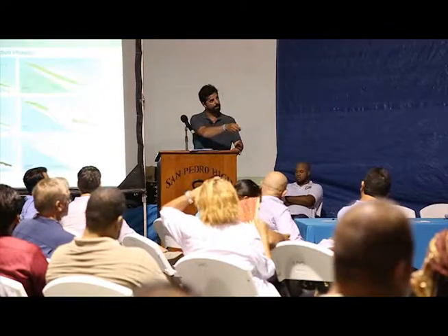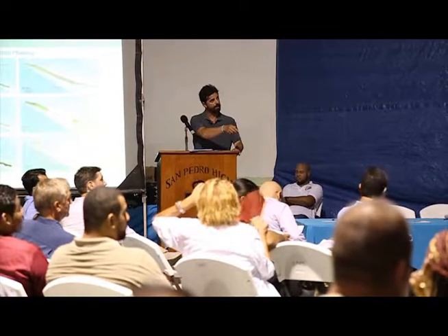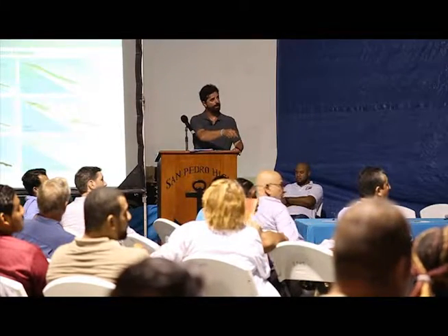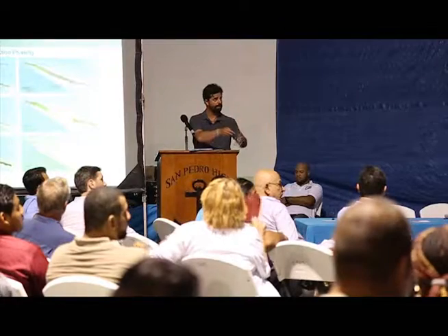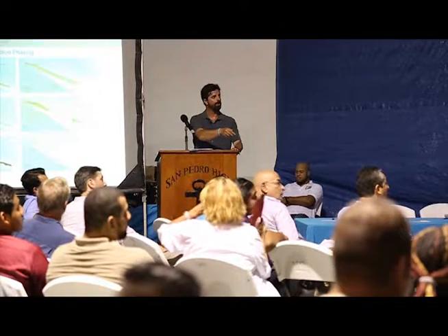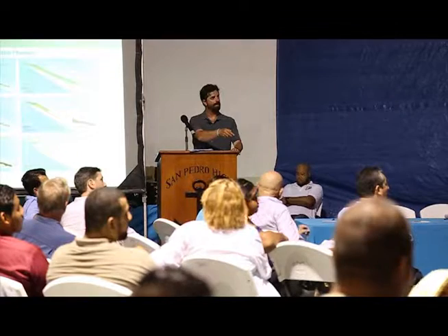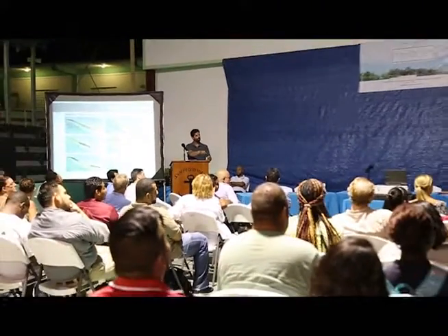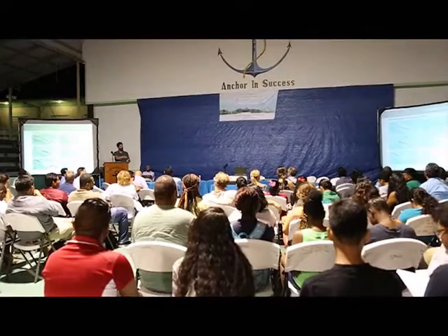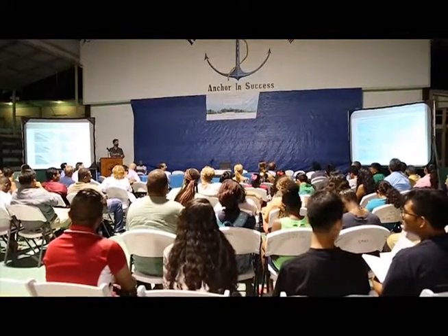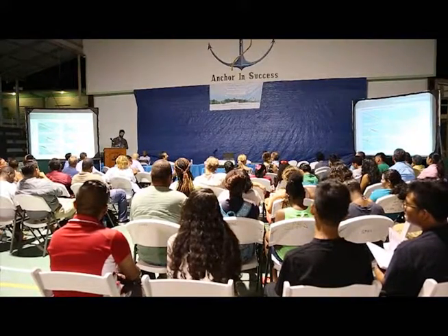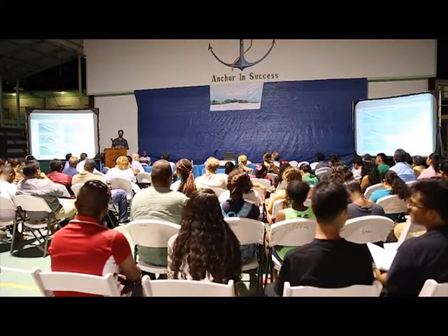First of all, the nursery will be established. I don't know if you can see here in the northern sector. Only 3 entry points will be activated or established on Blackadore, the 3 of them on the west side. From the center, the construction will start working south, and when that process is finished, the revegetation will occur, and only then 2 other entry points to the north and south will be implemented in order to complete the construction of the site. What we are trying to address with this process is to keep the island alive.